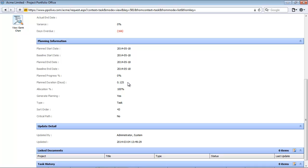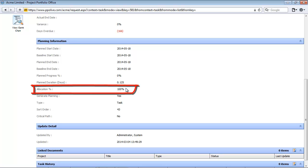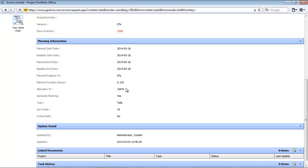The value provided is in days, but it will be converted to hours based on the specified standard hours for the employee. The next field is the allocation percentage. Even though a task duration may be, for example, five days, it does not necessarily mean the responsible person will spend all their working hours and effort on this one particular task. The allocation percentage field shows the amount of the resource's total time that will be devoted to the task.